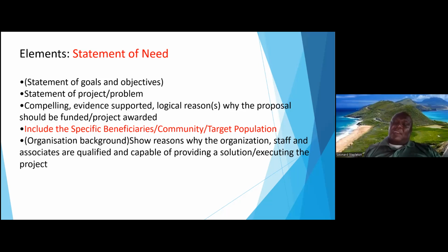You have to calculate how much it would actually cost if they had charged you. That would come down in the budget section, because in the budget you have to show how much of the items and services you're going to pay in cash, and how much you're going to get in kind, meaning the person is not going to charge you. But you must put a dollar amount.